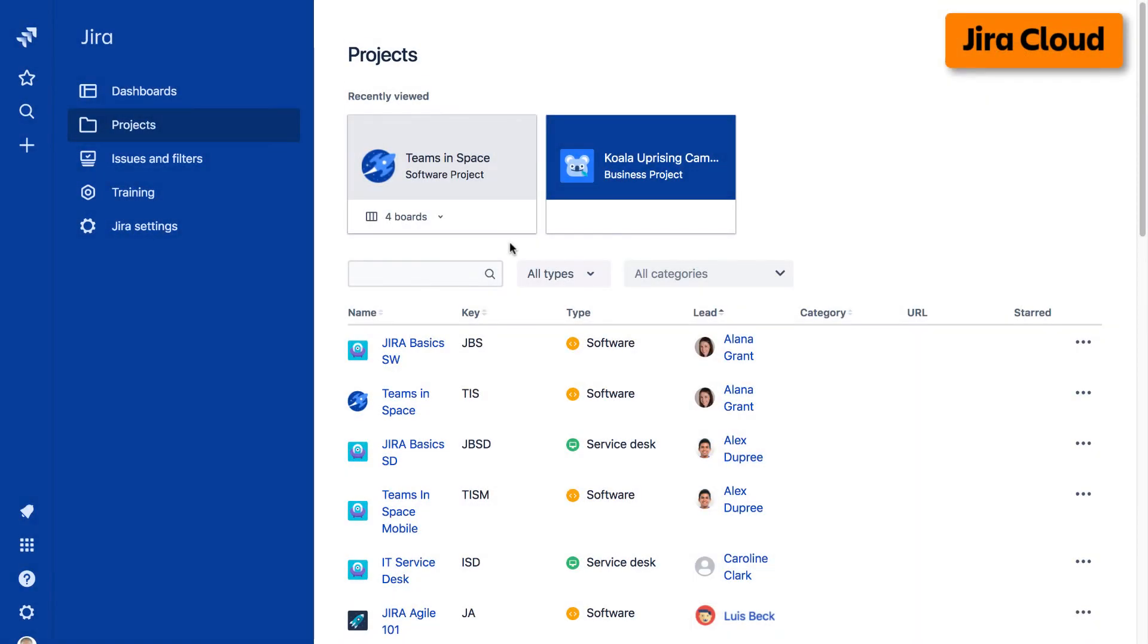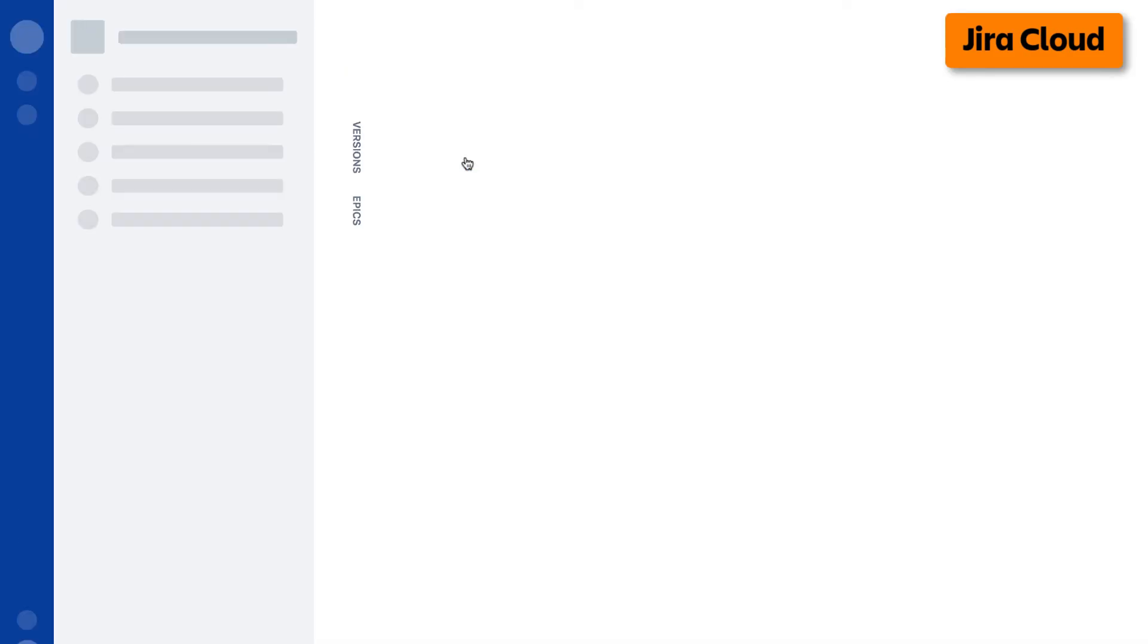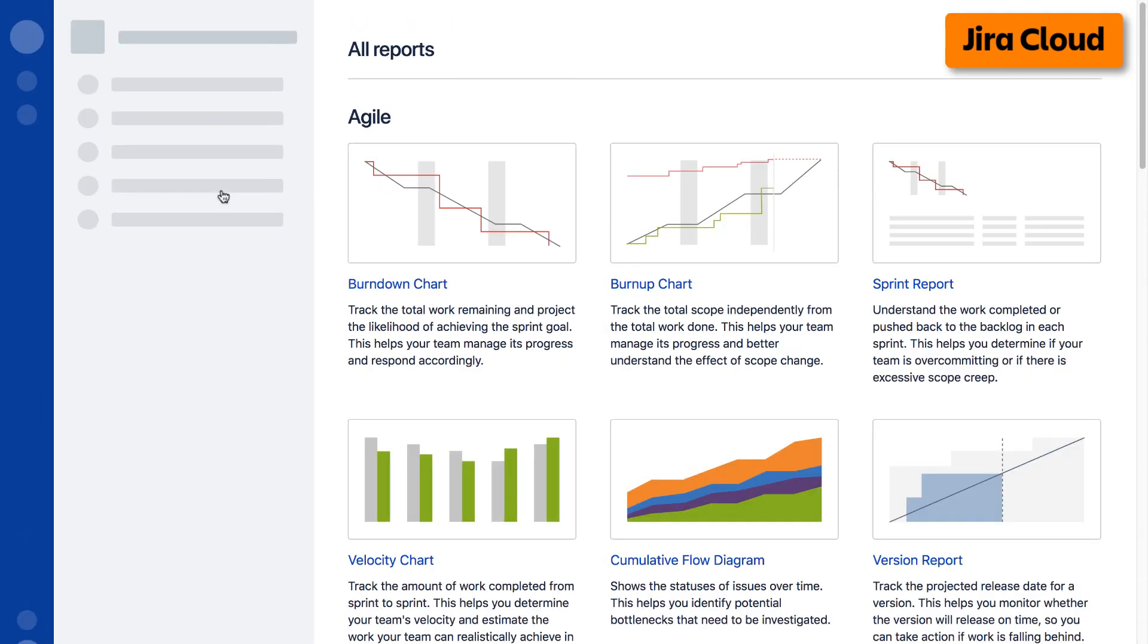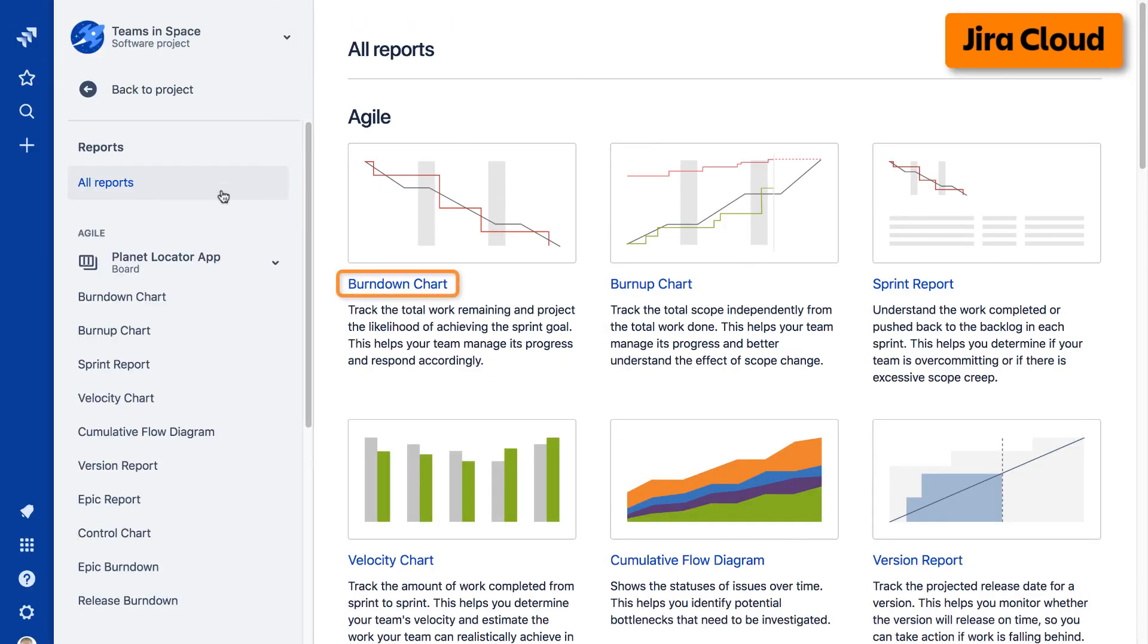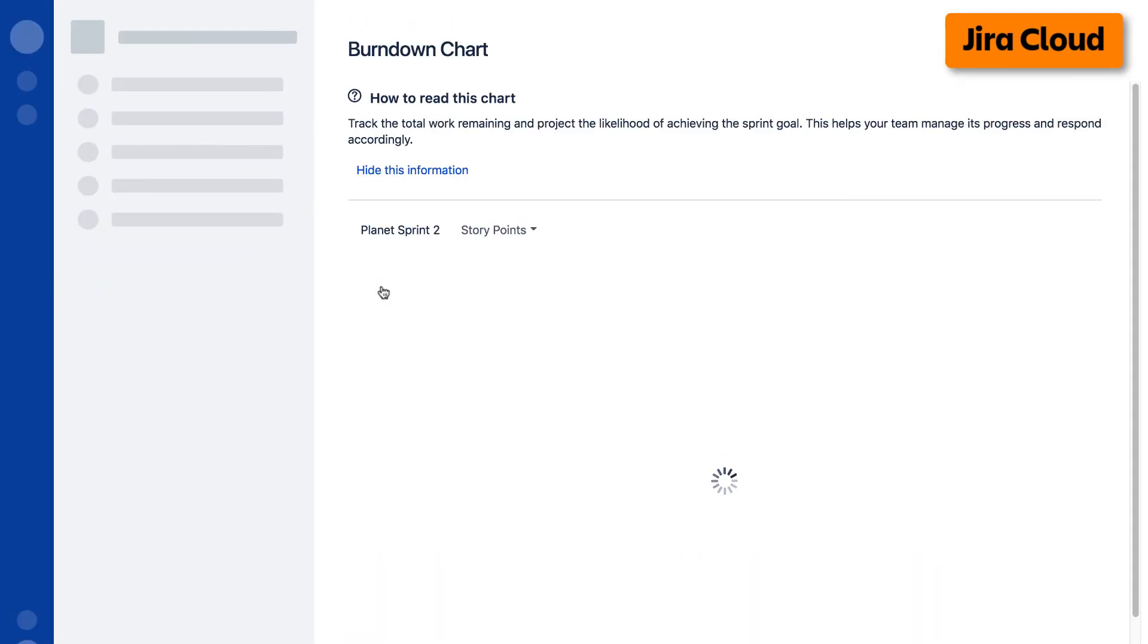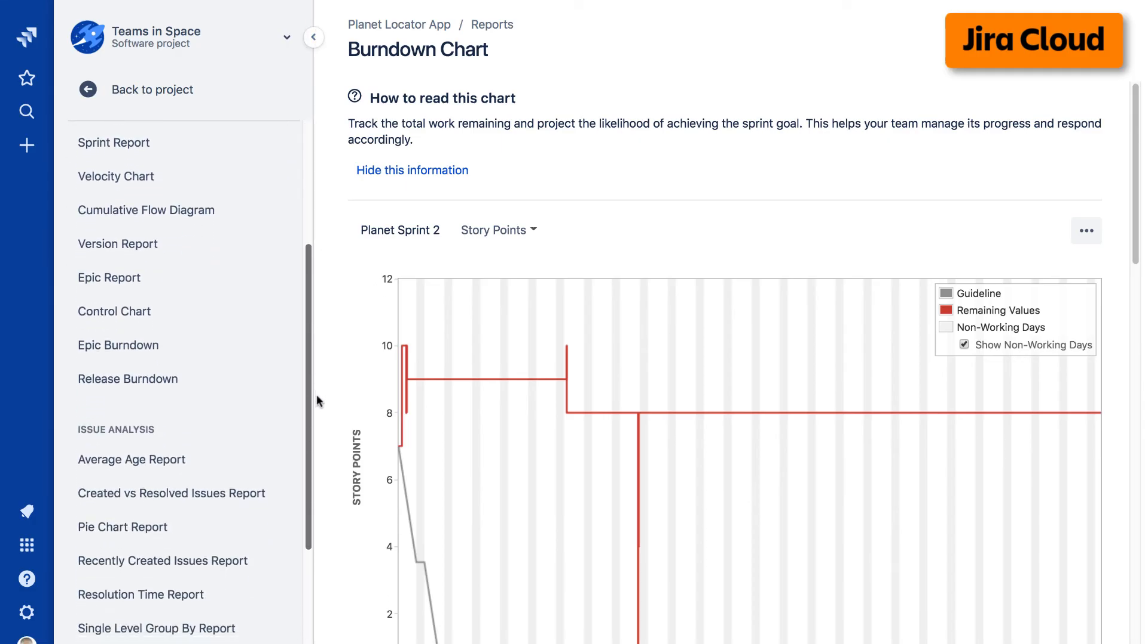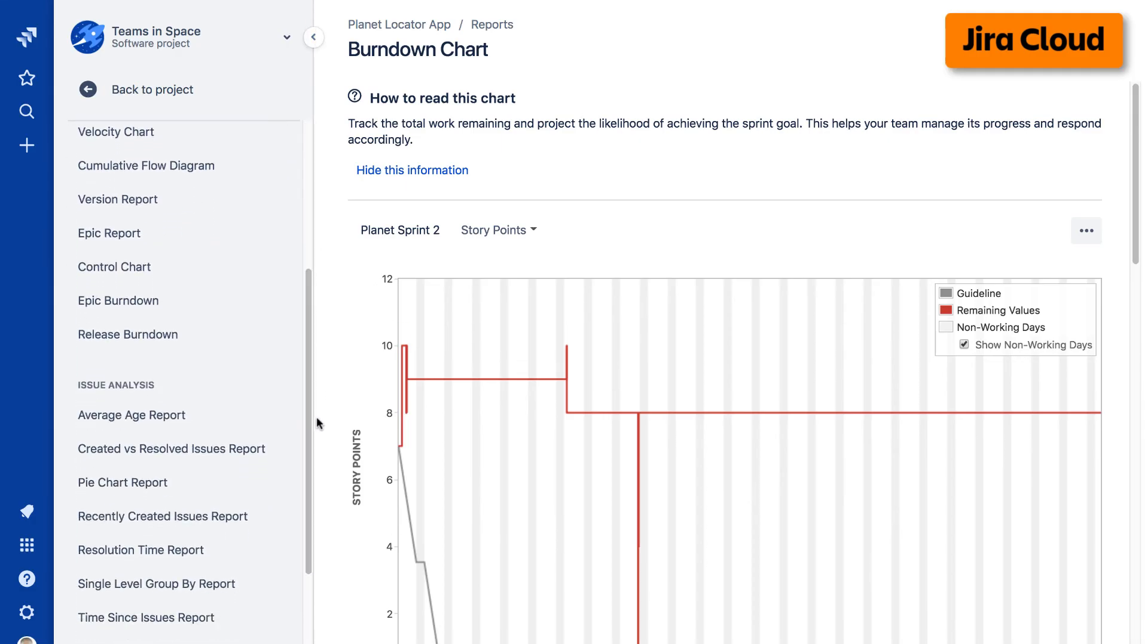To access reports on the cloud version of Jira, navigate to your desired project, select reports from the left taskbar, then select the desired report from the Agile Reports display. Alternatively, you can select a report from the report list in the left taskbar.